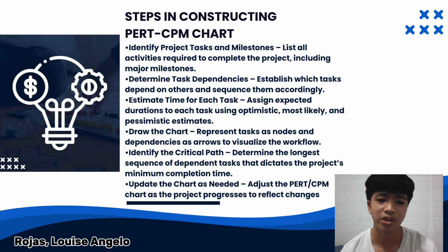And second, determine the dependencies. Some tasks depend on others before they can start. So, for example, before installing the hydroponic system, the farm must prepare the site. This prevents delays and ensures a smooth workflow.